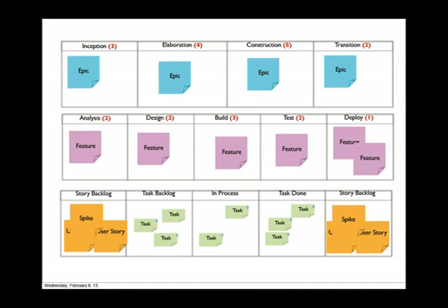It helps organizations visualize the work that they've got going on in the system and where everything is and the level of certainty associated with it. As you might imagine, the stuff to the left at every level is way less certain than the stuff to the right. So if I'm an exec, I don't make commitments on things that are in inception or elaboration. But if it's in construction, it's been slotted for release, it's been risk reduced, I understand the transition plan, then that's something that I can start talking about in market.